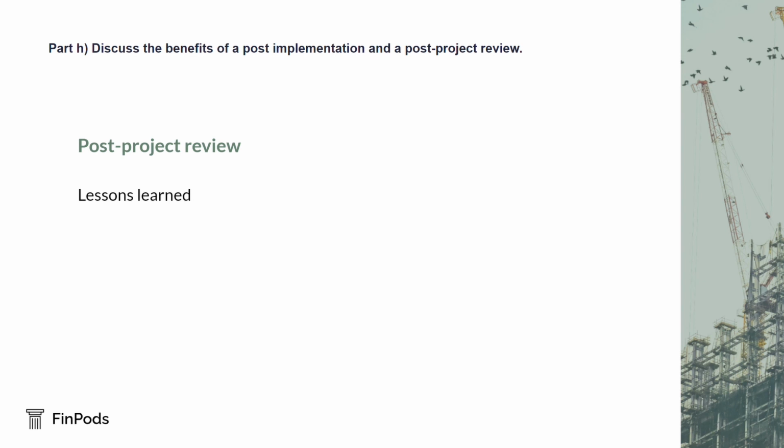The review is intended to be beneficial to the organisation as it considers the success of the project by asking the following. A. Was the project achieved on time and within budget? B. Was the management of the project as successful as it might have been, or were there bottlenecks or problems? This review covers 1. Problems that might occur on future projects with similar characteristics. 2. The performance of the team individually and as a group. In other words, any project is an opportunity to learn how to manage future projects more effectively.